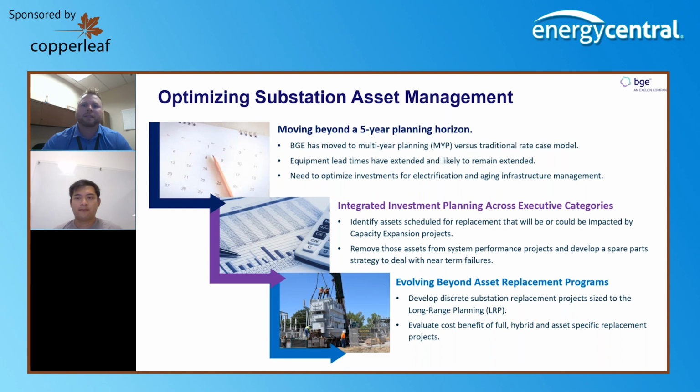broader sense. And that'll lead to a couple other things down the road once you have that big plan. And one of those things is at BGE, we've moved from a regulatory filing perspective to what is considered a multi-year rate plan. So here's where we file in advance, hey, here are the investments that we plan to make over the next 3 years, right? And then we're held to being able to execute to that.